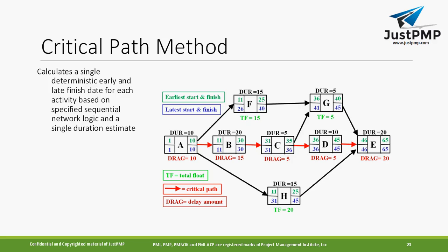When you are developing a schedule, you already have the activities in sequence, but you have to give the number of hours, or the duration, and determine the final duration of the project. So the critical path method is used as one of the tools and techniques for developing the schedule.